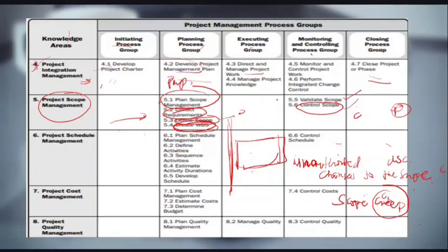No. You get it? So whenever there's a change, other things are changing. So when this one comes in, CCB will check how much cost should be added. Who is paying for this? Is mom ready to add more money to the budget, asking us to call all students? So that is how it works.